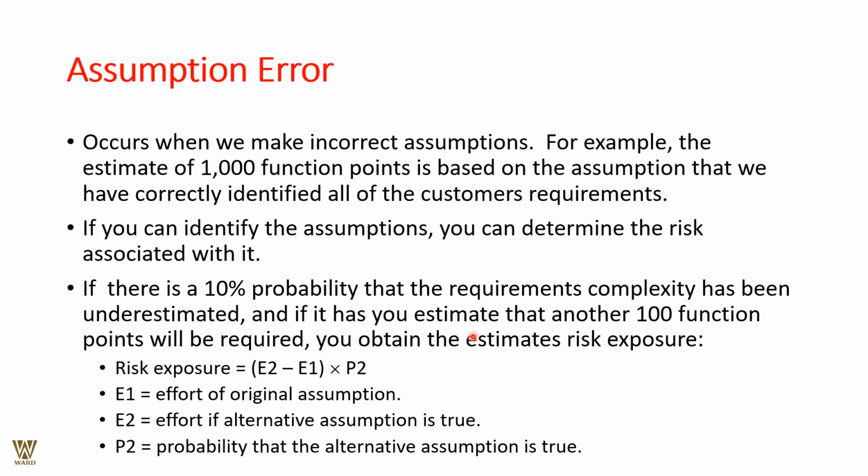The assumption error occurs when we make incorrect assumptions. For example, the estimate of 1000 function points is based on the assumption that we have correctly identified all the customer's requirements. If you can identify the assumption, you can very well determine the risk associated with it.